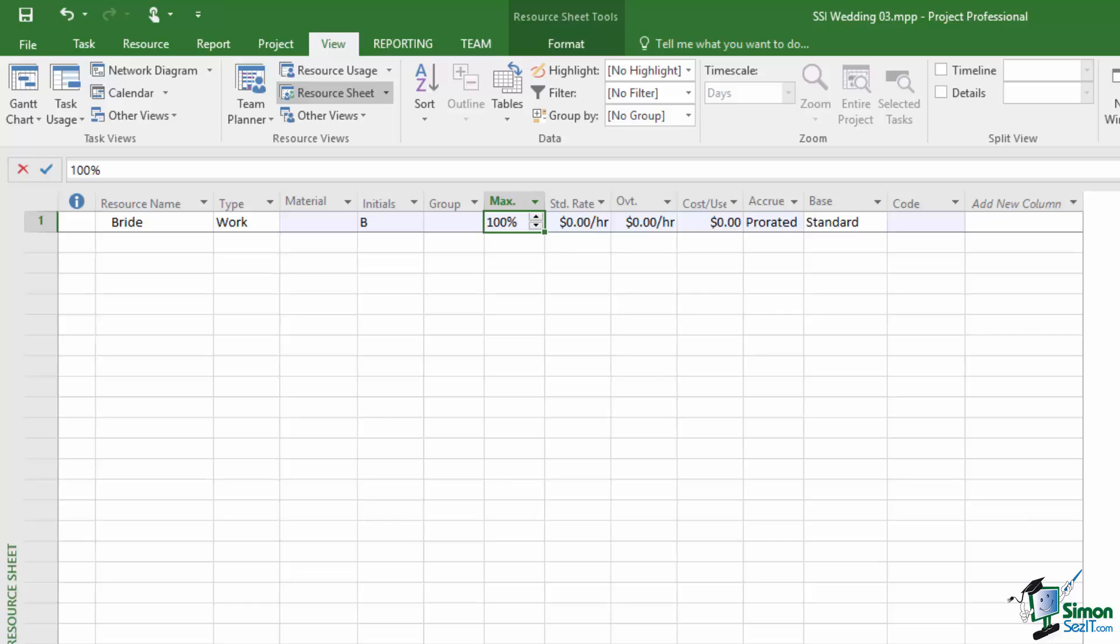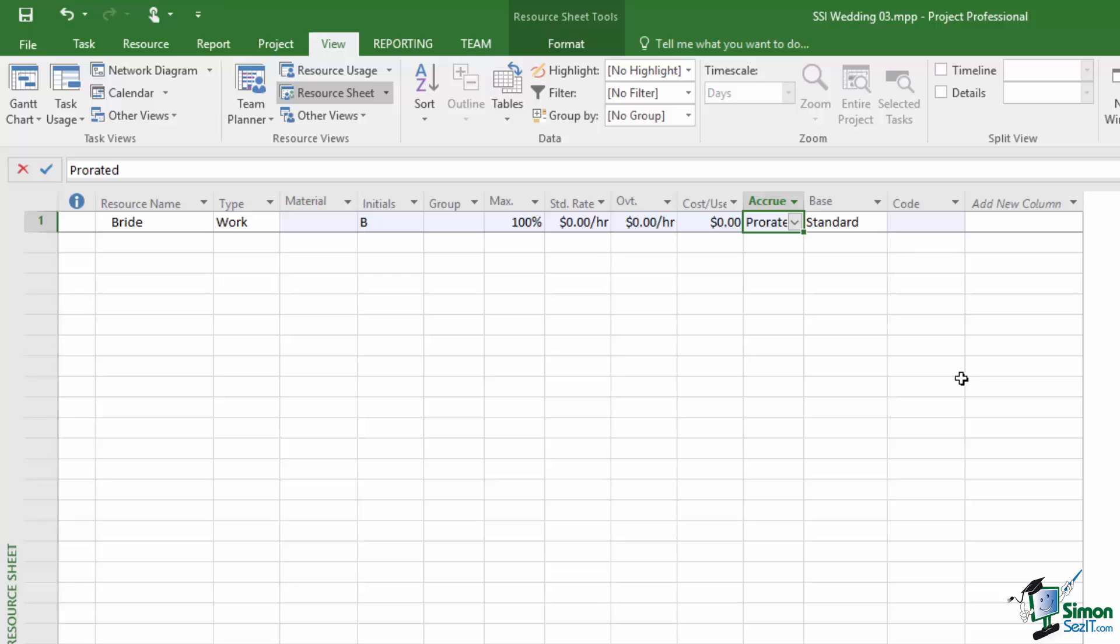I can say the standard rate that it cost me to employ those bricklayers and then I can also enter an overtime rate. I also have here a cost per use. So if a particular resource has cost per use, for example if I'm dealing with something where there's a setup fee, perhaps a delivery fee or a contract fee or a hiring fee, a one off cost I can specify that here. I will normally also specify an accrual method. For the moment I want you to ignore accrual and I also want you to ignore the next column which is the calendar that this particular resource uses which by default is our standard base calendar. We're not looking at calendars at the moment so just ignore both accrual and base.